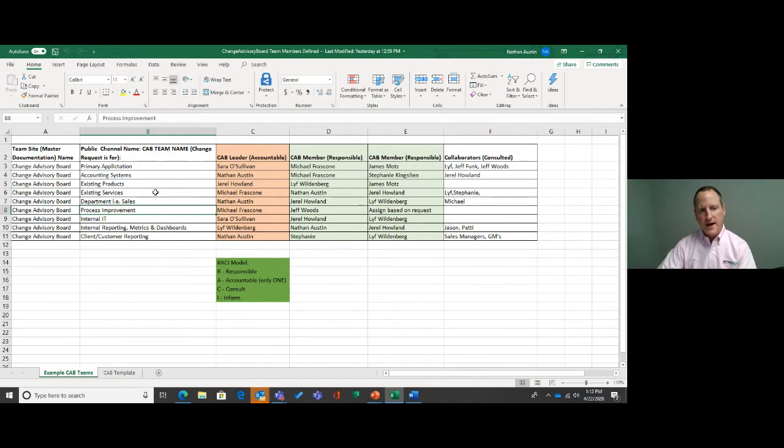And sometimes to be able to define these, it helps to think through what we call a RACI model. This is often used, you can Google it, it isn't a Mitekism, but I also sometimes feel like it should be called the ARCI model, but RACI just rolls off the tongue a little easier. Ultimately, there's only one person that's accountable. That's where this column comes into play: who in your organization, needs to be a person, is ultimately accountable for these respective areas of subject matter expertise? So that's the A of the RACI model. And then it's saying, well, who do you want to be responsible?